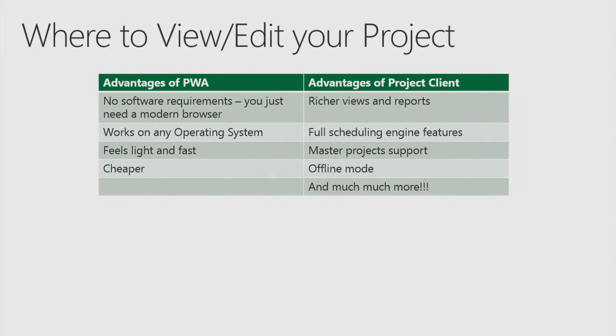We also have the full scheduling engine features. So the scheduling engine is in PWA, but it's not full featured yet, so you can't do things like leveling. Master project support is only in the Project Client, so if you use master projects, you can't edit them through PWA. The Project Client has an offline mode, so if you're getting on a plane and you don't feel like paying for the online, whatever, $8 it is, you can work with your project schedule still if you have the client, and much, much more.